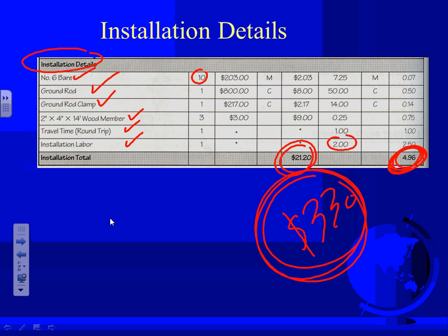Other people have to use our power to power their equipment too. So that's an agreement with the general contractor. Sometimes, guys, the general contractor provides the power, so who's going to be installing it? Us. So we get paid to provide power for all the other disciplines there, do the temporary power for the construction site. But that will be part of our bid. When you go bid a job, a stadium, part of your bid for the stadium is going to be who's providing temporary power during construction? Us, the contractor, or another contractor is providing.